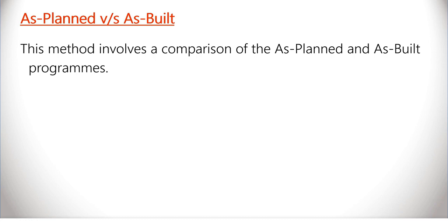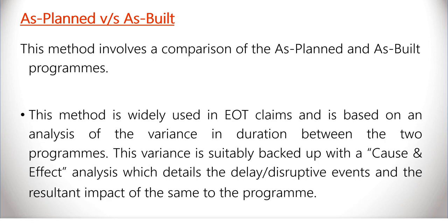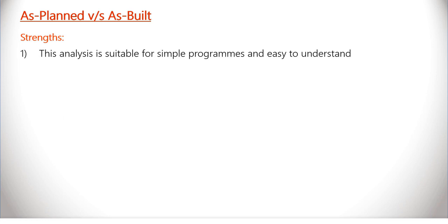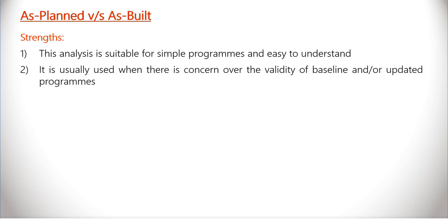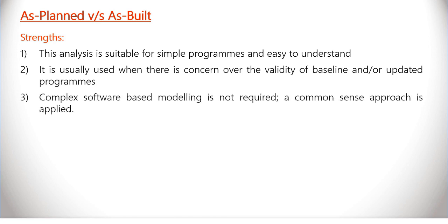Strengths. First, this analysis is suitable for simple programs and easy to understand. Second, it is usually used when there is a concern over the validity of the baseline and/or updated programs. Third, complex software-based modeling is not required, therefore a common sense approach is applied. This method finds favor with a lot of professionals who prefer to use a very simplistic or a big picture strategy to resolve delay issues.